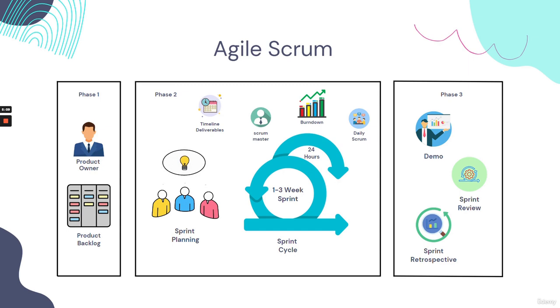Question number 1, what did we do yesterday? What was our goal? What did we accomplish yesterday? Question number 2, what are we planning to do today? And question number 3, is there anything blocking us from accomplishing or making progress in our goals for the day?